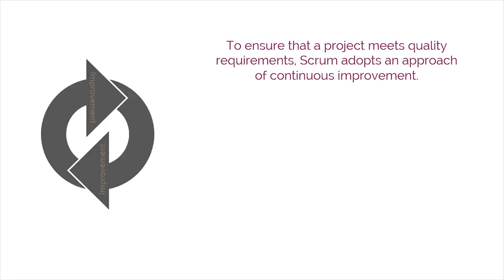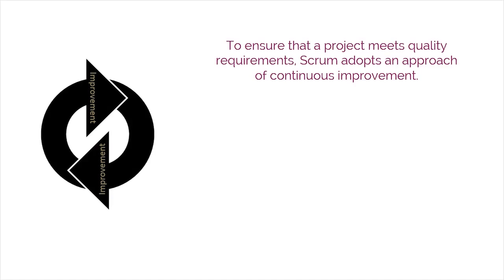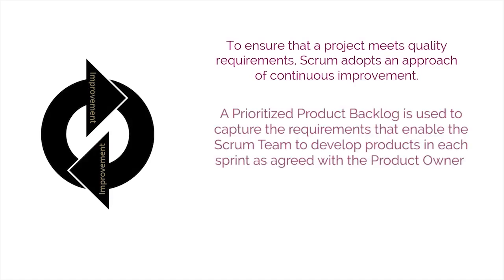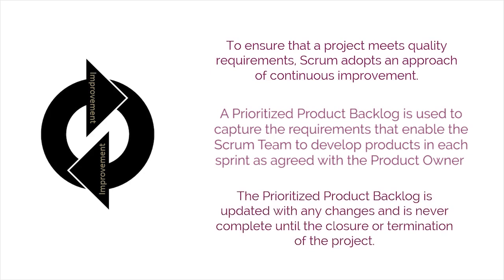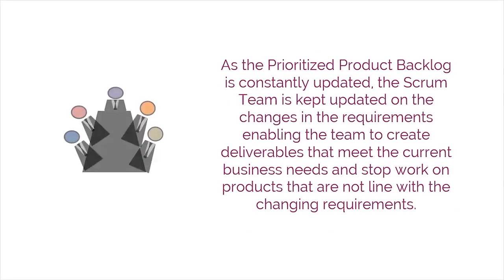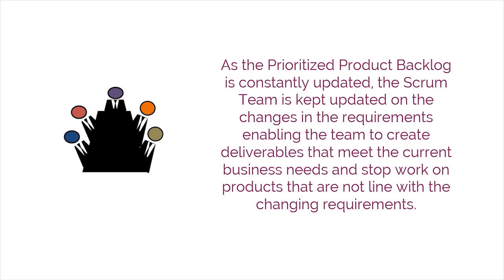To ensure that a project meets quality requirements, Scrum adopts an approach of continuous improvement whereby the team learns from experience and stakeholder engagement. A prioritized product backlog is used to capture the requirements that enable the Scrum team to develop the product in each sprint as agreed with the product owner. The prioritized product backlog is updated with any changes in requirements and is never considered complete until the closure or termination of the project. As the prioritized product backlog is constantly updated, the Scrum team is kept updated on the changes in requirements, enabling the team to create deliverables that meet the current business needs and stop work on products that are not aligned with the changing requirements.